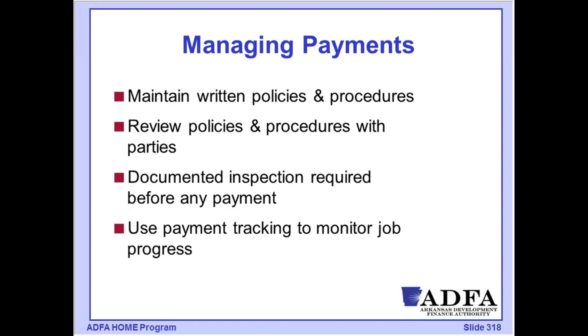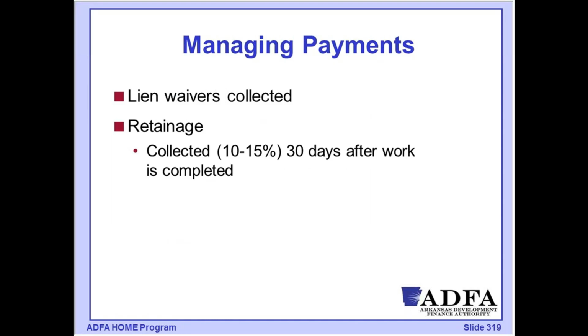That's one of the things we mentioned about the pre-construction conference, so that they understand what needs to be in place to be eligible for a payment, what inspection will be needed, and also the timing on that. And part of our tracking on progress is looking at the payments that are being processed to track the progress on completing each of those jobs.